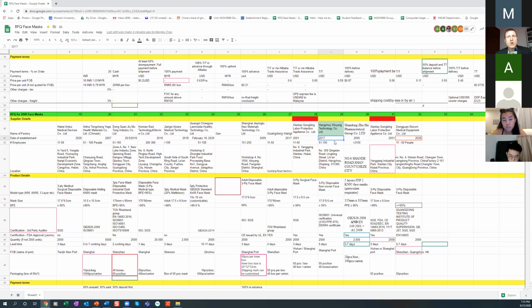You with me? So normally what you do is say, Mr. Supplier, can you give us a request for quotation nearest to your FOB port? Okay. And so normally, that enables you, one will give you Shenzhen, one will give you Shanghai, one will give you Wuhan, or wait a minute, Shanghai, Qinzhou. It's okay to compare different ports because those ports are closest to the location of where the factory is. And then that enables you to do the apples to apples comparison.